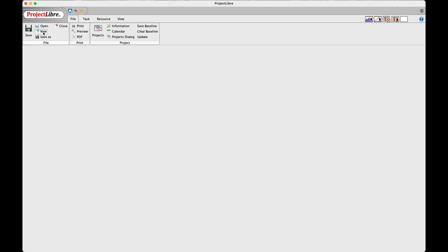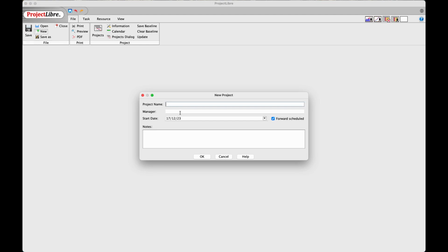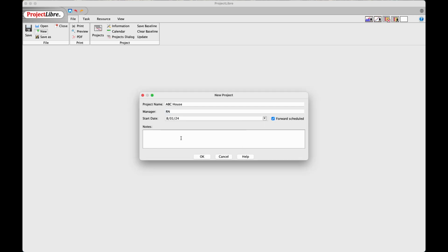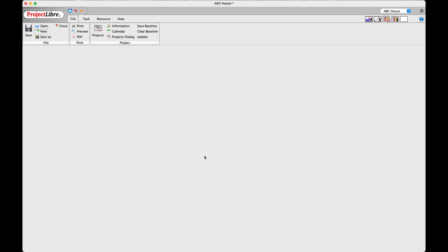I'm going to click New to open a new project. Project name I can add, for example, ABC House. I can add my name as a manager, RN. I can add a start date here, for example, January 8th. And if you like, you can add some notes here, then click OK.